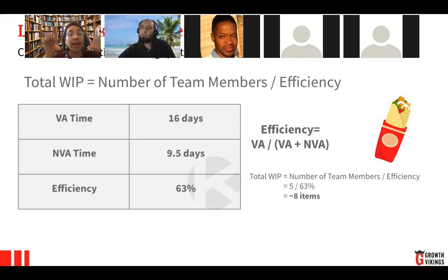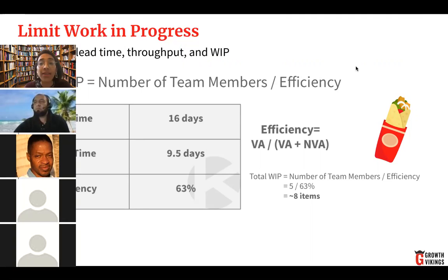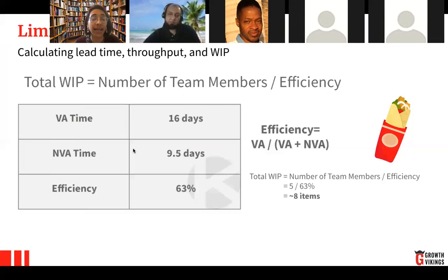So within the value stream, there are some stages that are called value adds, and this is decided by the team. What are the stages that generate value add? Because for some people, peer review of the code is a value add, and for other people, it isn't. Yes, it's a non-value add. So once you have the stages of your value stream, as a team you decide which are going to be value-add stages and which are going to be non-value-add stages.